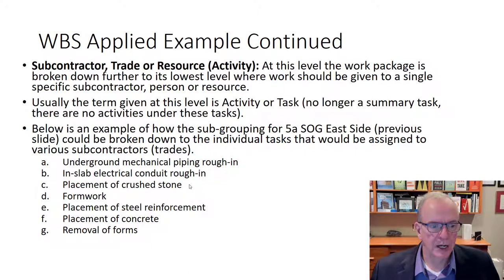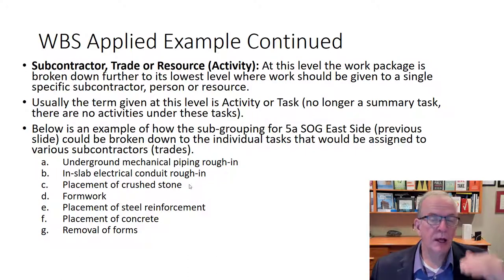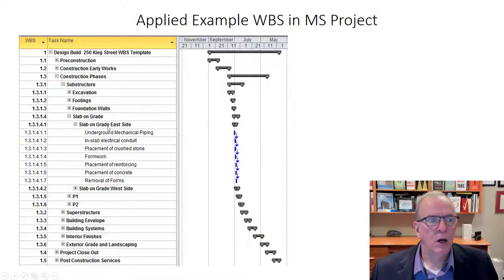So I can monitor that, and I can check my costing, how I'm actually doing on the specific projects. At each level, the amounts of money sum up. So I can see how I'm doing in the substructure area, how I'm progressing, and I can go very granular down to lower levels to get a good picture of how we're doing overall on the project.